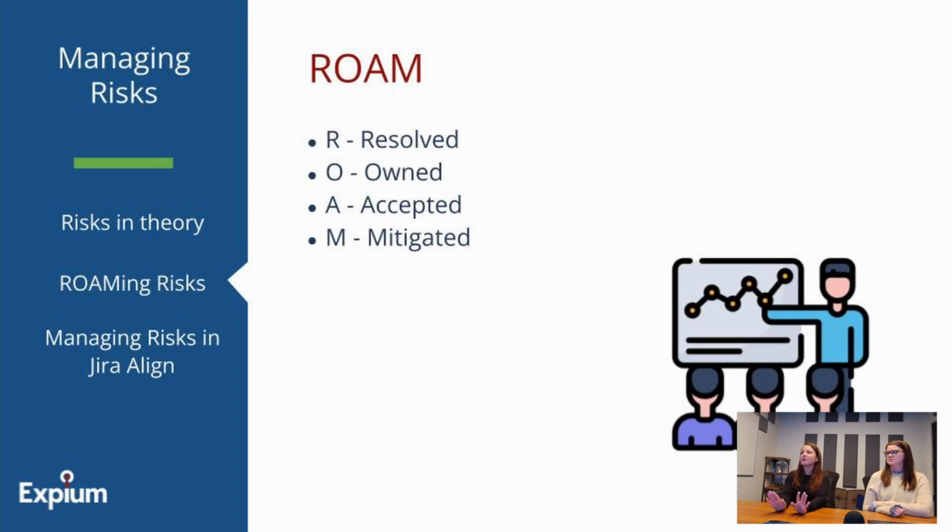Another example that I hear mostly when I talk about how I don't like accepted risks and we should always remove them, somebody says, well, what about a natural disaster? For example, we know that there's likely going to be a big snowstorm that will impact the plan in some way. And while obviously we cannot change the path of the storm, what could we do? We could reduce the scope of the quarter. The business teams could work with their stakeholders to change the date on the release. Just some ideas. So if accepted is the most risky status, what do you think is the least?